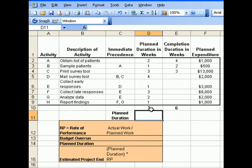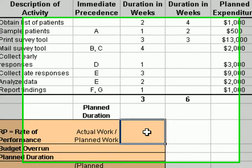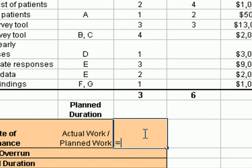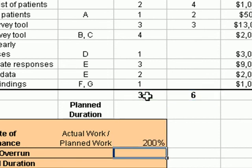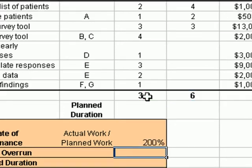That will help you determine what the rate of performance will be for the data of the project given to you. Let's continue with the rate of performance. We'll take the actual work, which falls under E10, divide that by the planned work, which is in cell D10. And we have a 200% rate of performance.